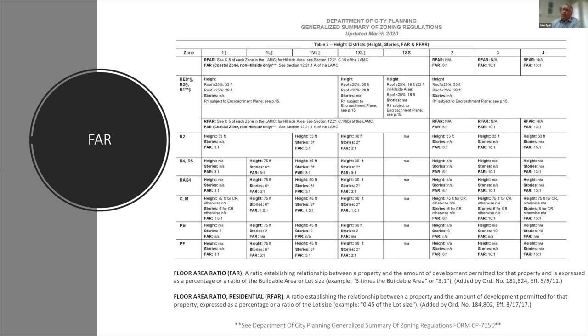There is a basic established norm in the industry, which is that 15% of the building area is associated to circulation. So you can take your unit type and multiply that by the size of the unit, the number of the units, and then add 15%. And you can see if your site passes a preliminary threshold associated to identifying a proper site location.